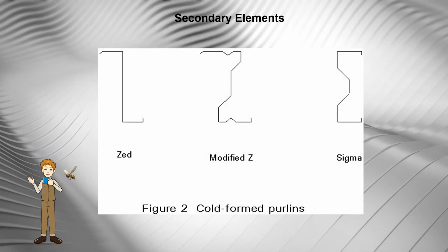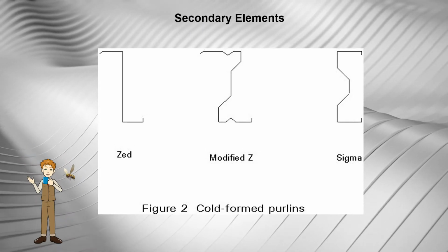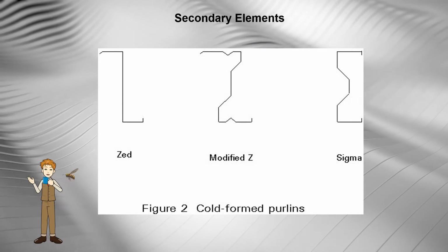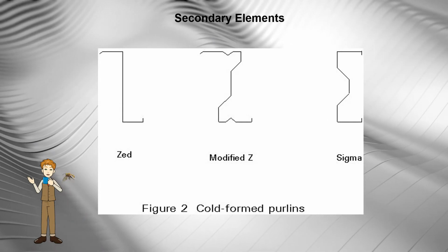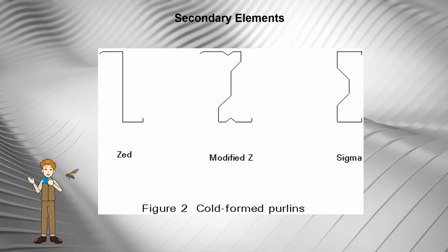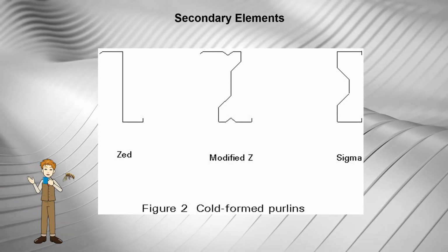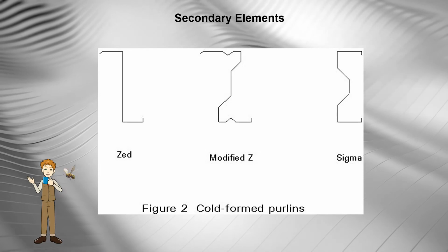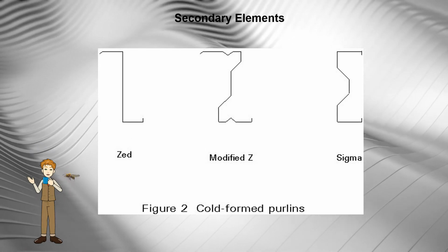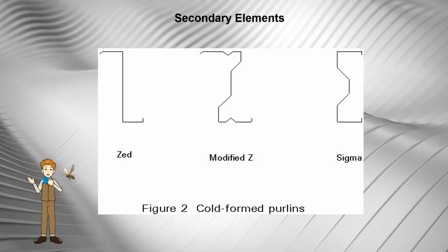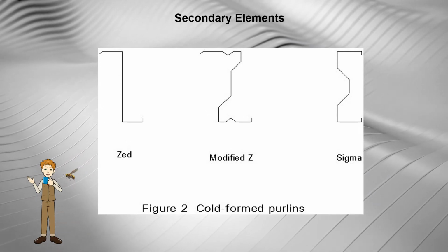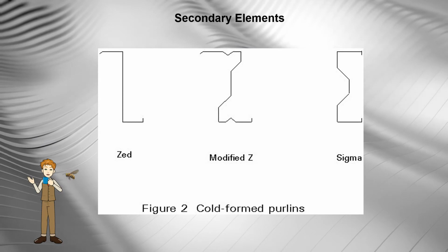These sections are of proprietary shape and are produced to order on computer numerically controlled rolling machines. These processes are extremely efficient since the components are delivered to site pre-engineered to the exact requirements. As a result, fabrication and erection times are minimized and material wastage is eliminated.